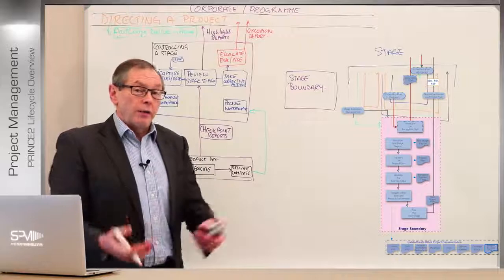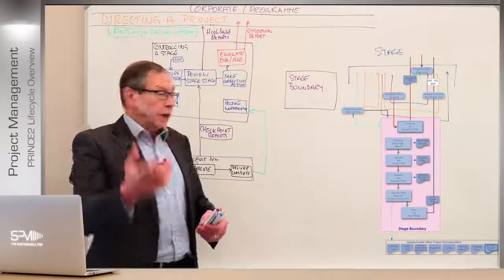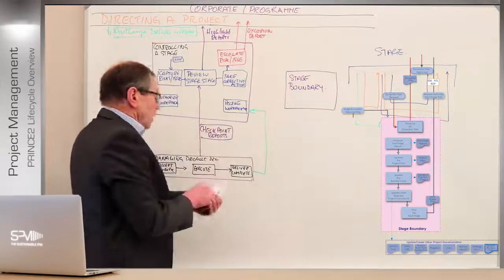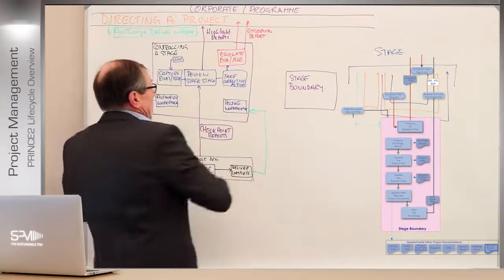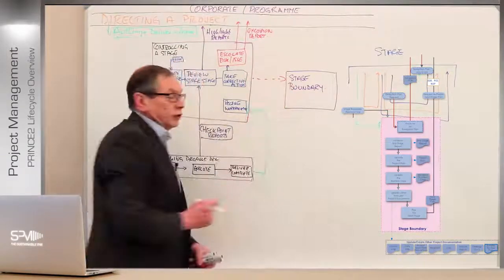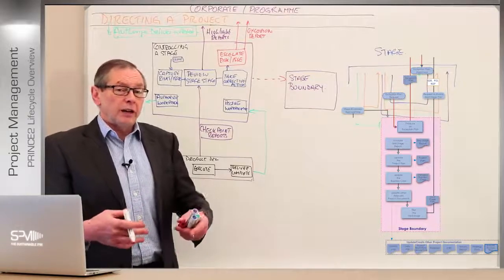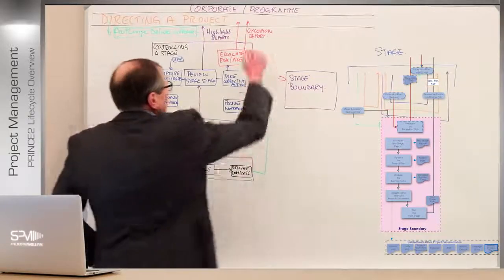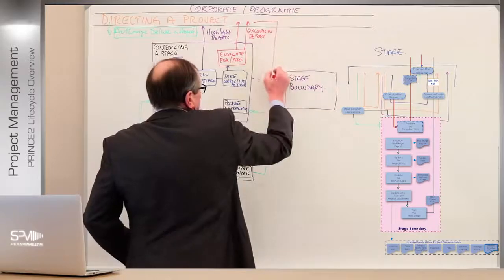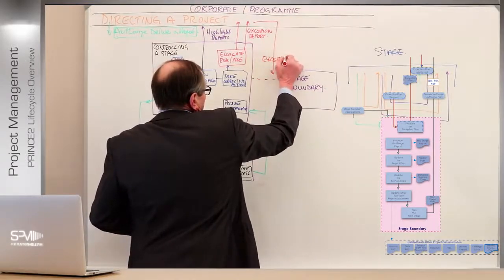Is it still desirable, viable, and achievable? Do we still want to go on, right? We'll get to that in a minute. If, of course, there is an exception, and they decide they need a plan, then technically we are at the stage boundary already, because the stage plan is no longer viable. What they then need to do is ask for an exception plan,